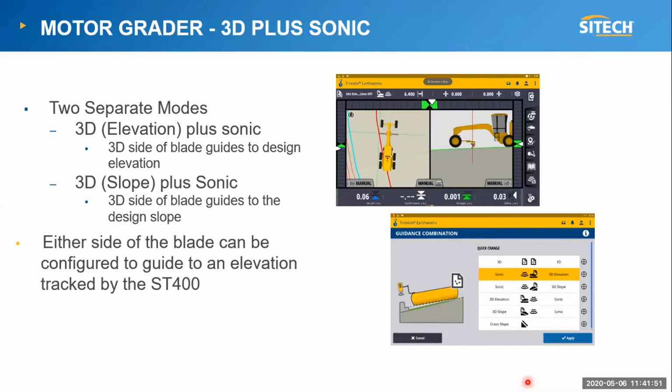The other benefit of this, or one of the other applications of this, is if you are building a road, you might have one lane which is live, so you'll have the live traffic pushed over into one lane while you build the other lane in the meantime. As soon as you've finished building that lane, you're now going to swap over the traffic onto the newly finished lane so that you can carry on the unfinished lane. Very often it's a challenge to get the two of those lanes to meet really neatly at the crest.